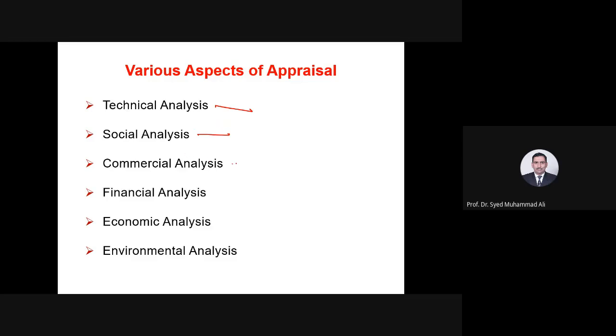Then commercial analysis: how much revenue is being generated. Financial: how much cash flow will come and go out. Economic analysis: what economic parameters are being considered, what is the discounting rate, in how much time are we going to recover, and so on. Environmental, I just talked about climate change, for example. That analysis also needs to be seen.